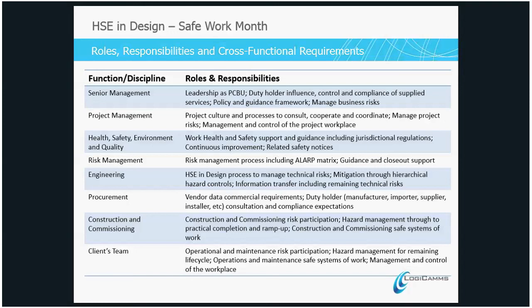Procurement. So procurement has an impact as well, because there's a number of aspects here. If we're getting vendor equipment, one of the things we want to do under those contracts is set out fairly early with those vendors what our expectations are with hazards and risks that they're aware of with their products and how they may affect our design. Also, as duty holders, you've got manufacturers, importers, suppliers and installers. So they all need to be considered from a consultation point of view and a compliance and expectations.